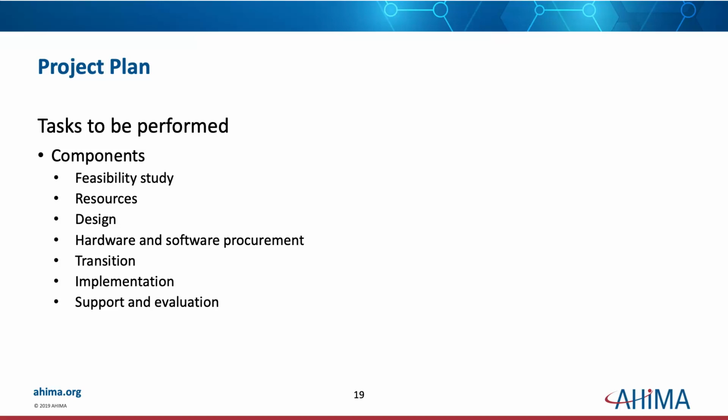For instance, you have to draw a line in the sand and say, we're going to start using the new system at this time on this day. So up until then, are you charting in the old system? When do you stop charting in the old system and start charting in the new system? When do you stop and say, we're going to take a snapshot of the old system and convert it into the new system, and anything after that won't be converted and uploaded until this date and time?